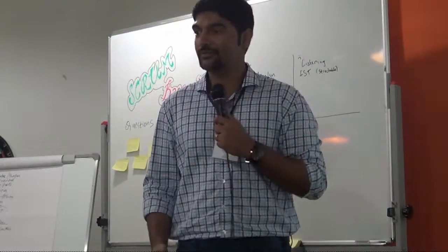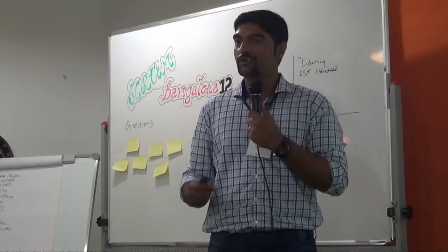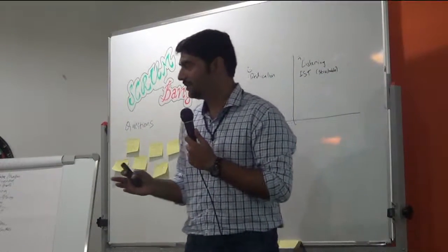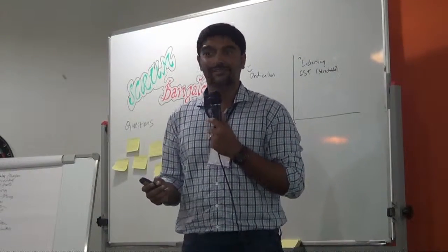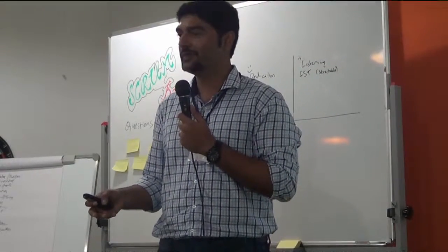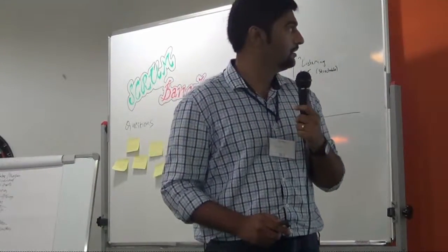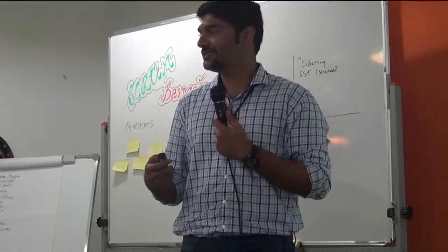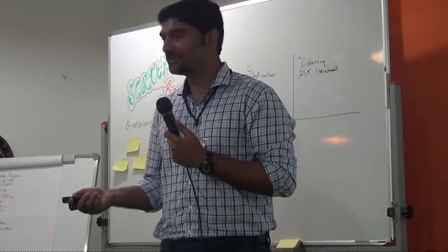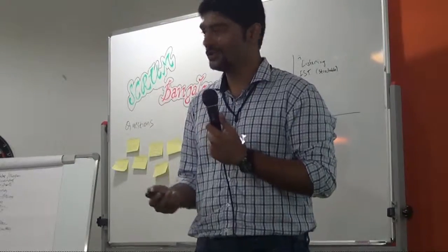And this is one kind of badly planned release, an under-planned release. The problem is people tend to think, oh, okay, let's not take a chance. If we screw up, it's going to look bad. So we'll overestimate it. Right? Or maybe you just thought it's much harder than it looked. And over-buffered, this was again something we saw with the newer POs who come in. Right? They say, okay, we'll give the team a little leeway so they can play around. And you end up overestimating so much. The stakeholders come and look at you and say, why are you wasting so much time? Right? And you're looking at your team and they say, we can do better than this, you're not expecting enough. So it works both ways.